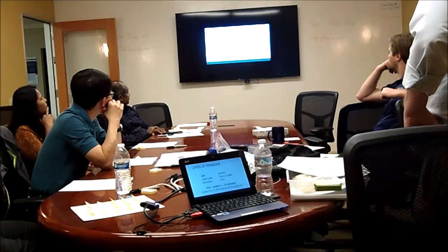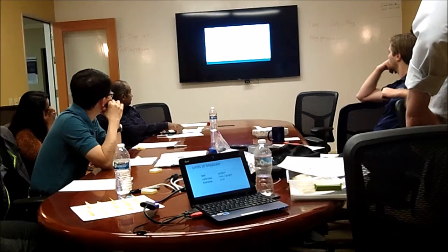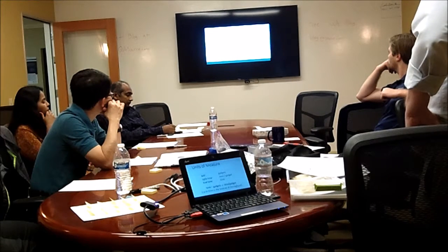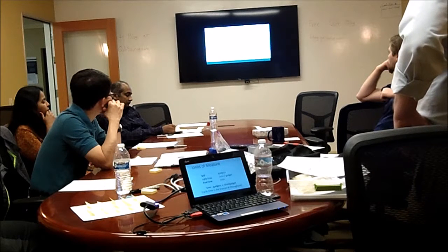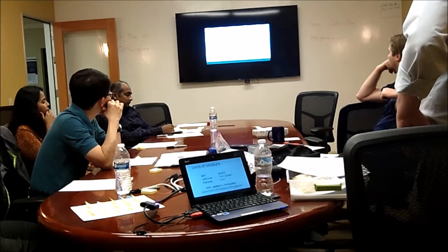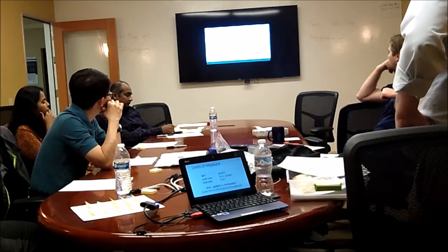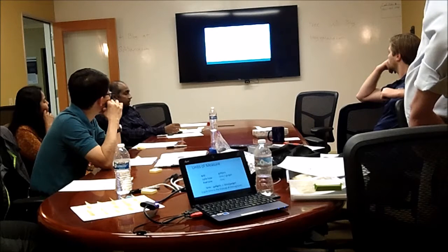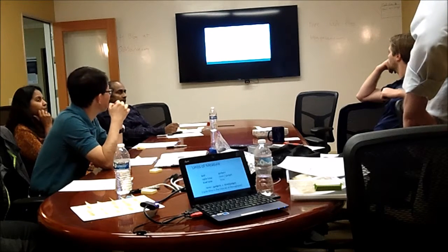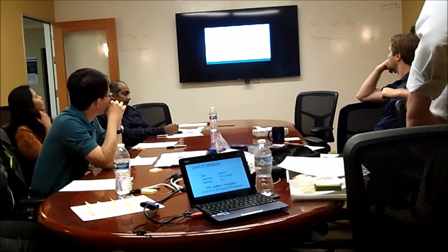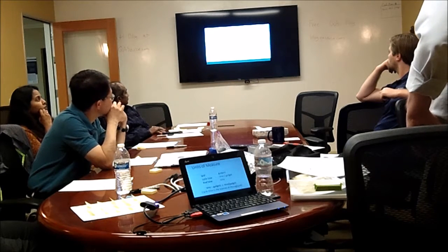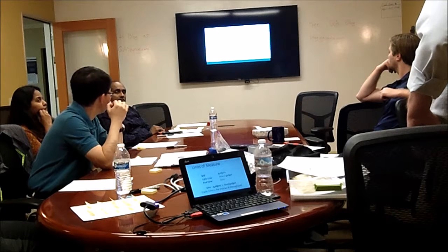You can see that the lead time, I'll go back to the other slide. Lead time is what we're after here, and it is WIP times cycle time. So lead time, time, equals the number of gadgets times time per gadget. You see that gadgets cancel out algebraically, and so you have time equals time. And in parentheses there, cycle time is the inverse of throughput. And that's sometimes useful to know.